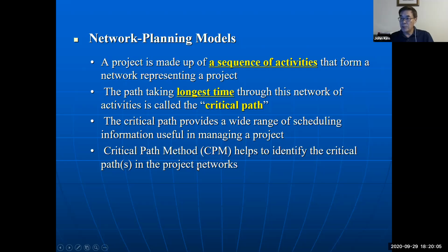And also in the video, it says do first and then next, like that. So for example, before digging the ground, they need a survey of the ground, what is under the ground, like a sewer system and electric line system.